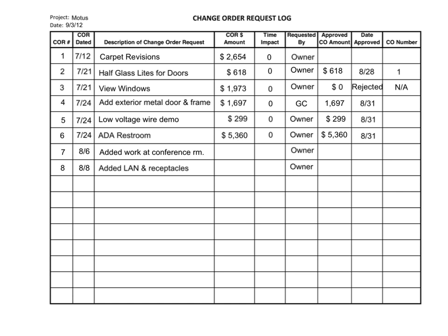Upon further inspection of the document, you will notice the details concerning the change requests that are in various stages of approval. You will see that change order request number 2 has been approved by the owner. The amount is $618. So the contract has been updated with formal change order number 1, and the contract amount has been increased by $618.